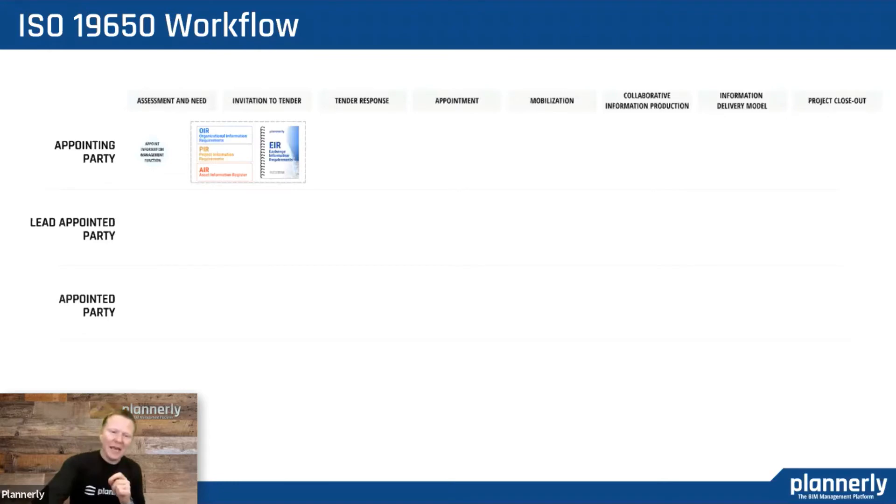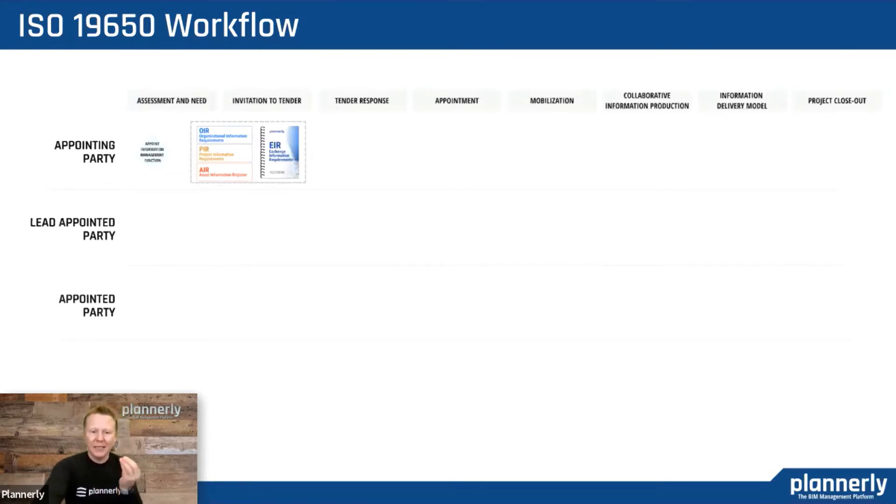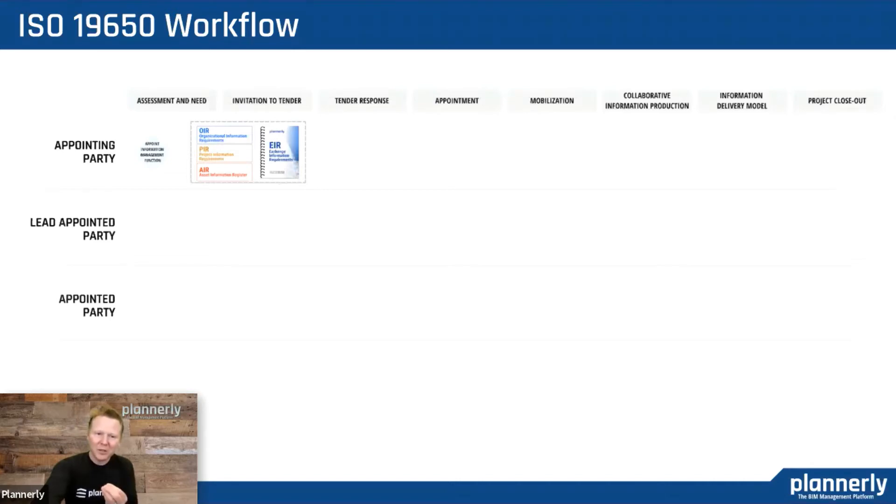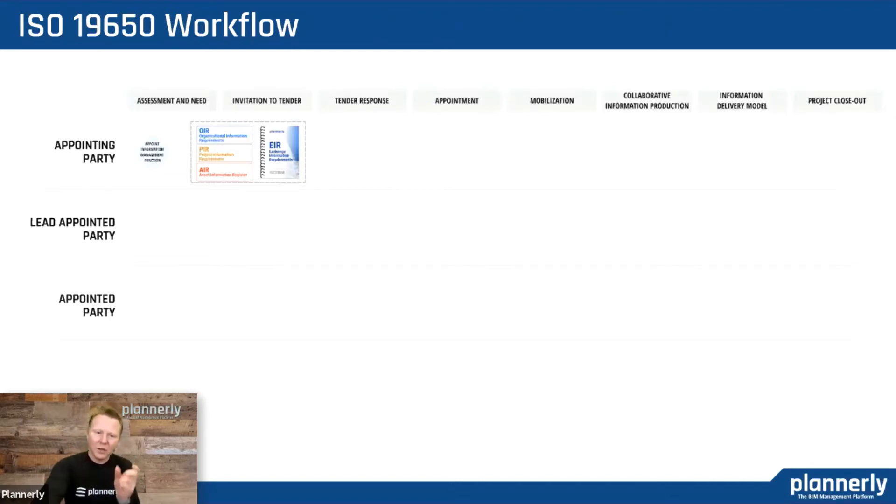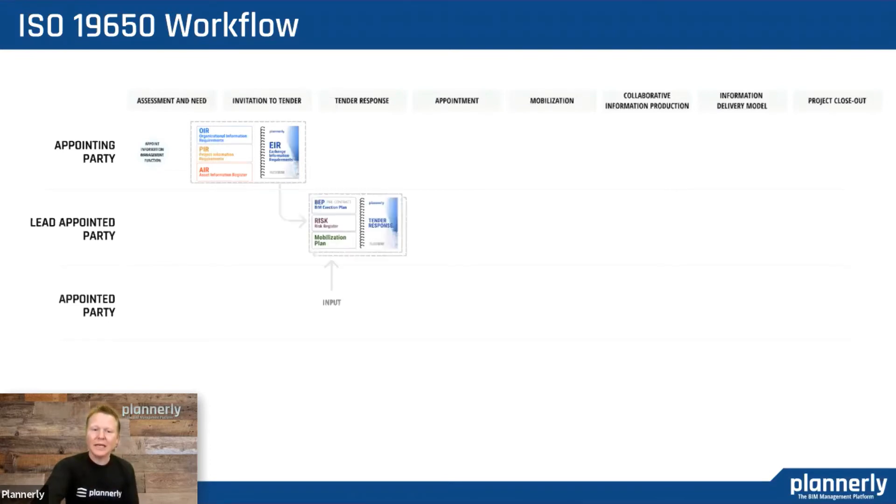Hopefully the appointing party has a group of documents that corresponds to an invitation to tender. This is the bidding process. Those documents combine into the exchange information requirements that we get responses from the prospective lead appointed parties.